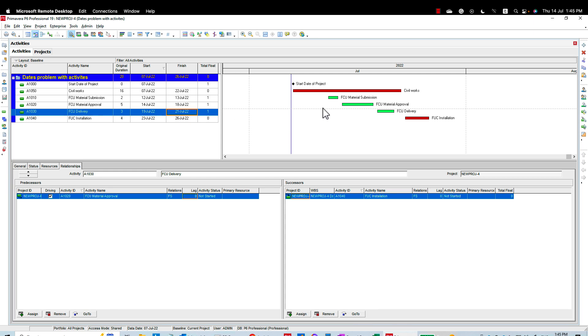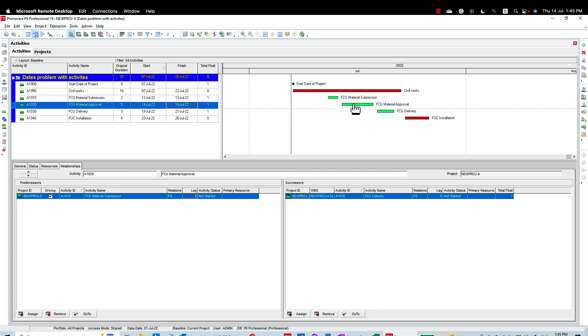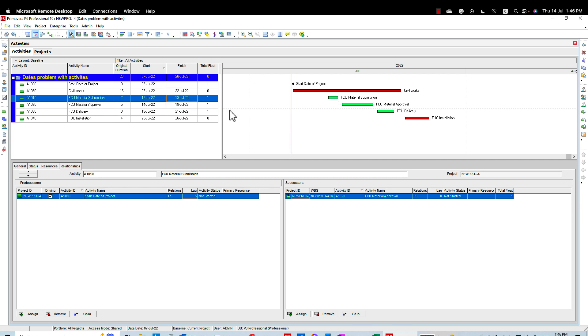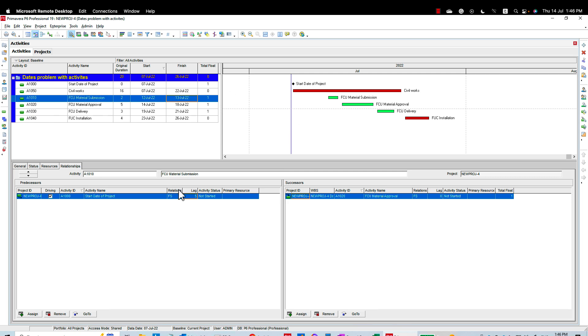But I don't recommend this method. Why? Because I need to be on the safe side. I need my material to be submitted, approved, ready for procurement. So I recommend to have these two steps which are out of my control, because the consultant or the client might take more time approving the material. And if I did it like this, I might be in trouble because the material approval could take more than five days.